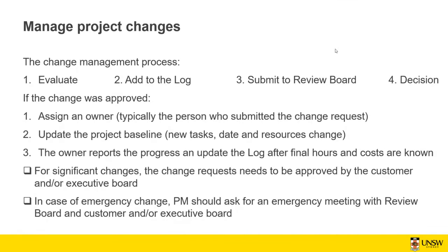And then you need to update the project baseline. If there is any new task, date or resource change required for this change, you need to update the project baseline in order to monitor this change as well. Also, the owner reports on the progress and updates the log after final hours and costs are known. This is the responsibility of the change owner. If you have any significant changes, for example, the change request needs to be approved by the customer or the executive board.